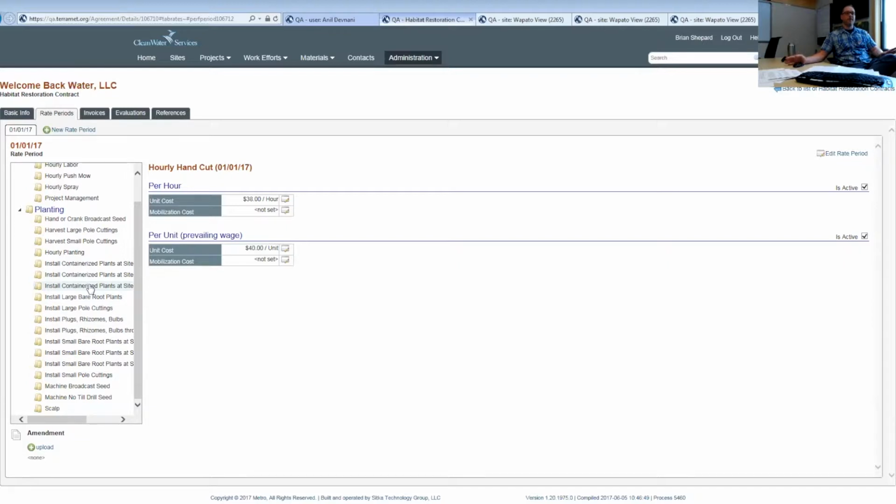So every contractor is bid on the same rate or the same tasks, and we have specified rates for both work that's done outside of the Oregon Bureau of Labor. So we have a couple different rate categories specified depending on whether we need to specify prevailing wage rates for a particular work effort or just the regular cost of those tasks.